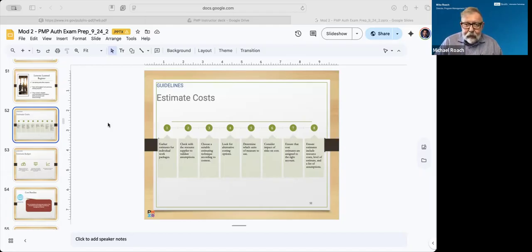And making sure that you have contingency plans against it is part of your sourcing division's job when you're running these really large projects. Now, if you're doing smaller projects, sometimes you just place the order and get the things delivered before you break ground and you just store it. That's also done. But for these really large ones where you're getting stuff in constantly for 4 or 5 years, you need to have those channels open for the entire time.